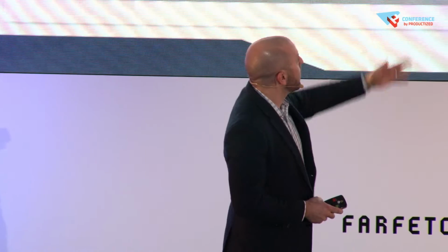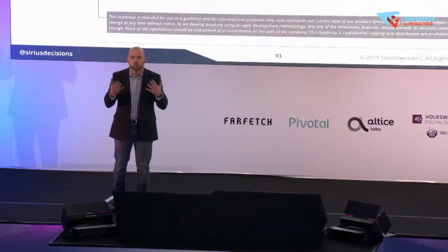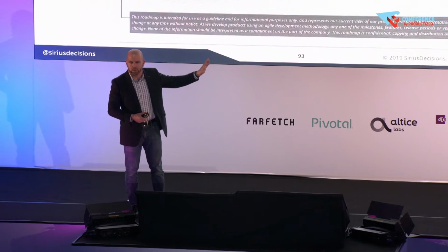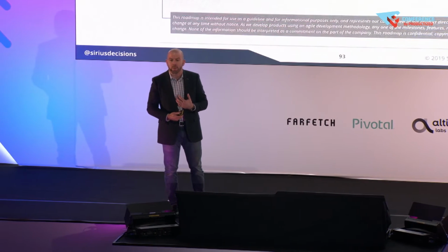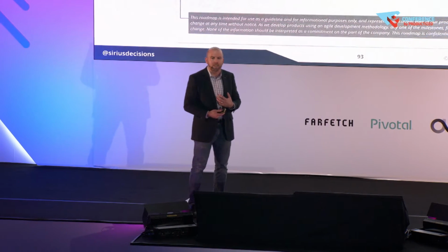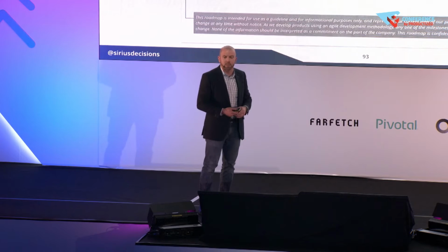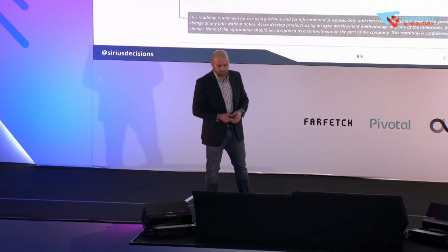So saying that this project starts in May and ends there gives a whole lot of detail that people don't care about, and also provides some level of assurance that really isn't there. That assumes that the developers are available to start on that date. That assumes that the project actually takes this long, and it doesn't. There's a whole bunch of assumptions that go into here that people will make inferences about, that we probably don't want them making. It provides this level of certainty that something's going to be released in the middle of June when actually it might be October.